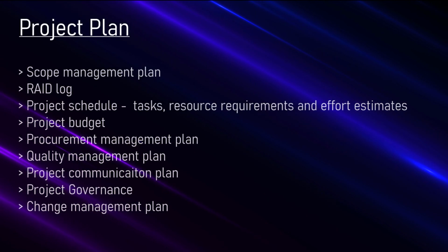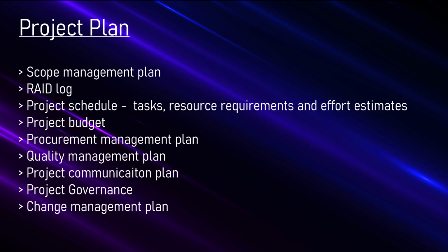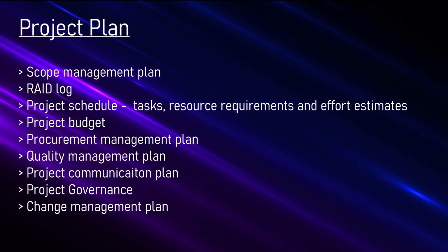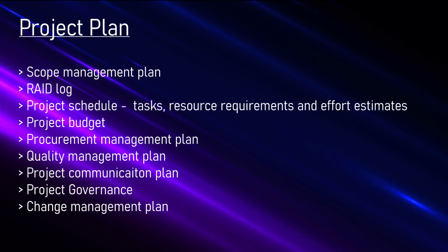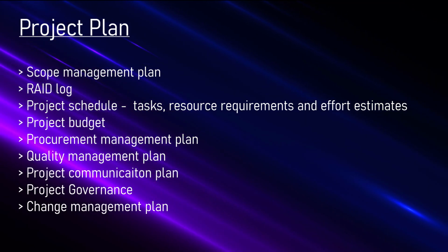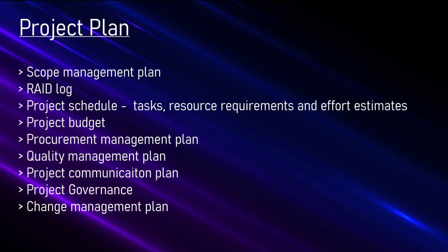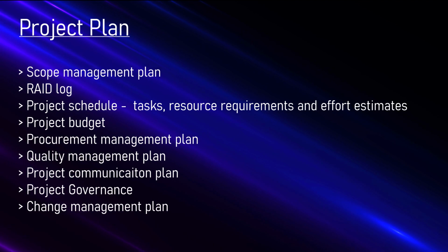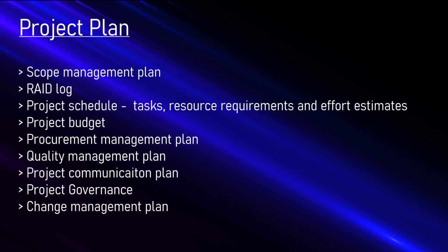This is then captured in the project plan and includes the scope, which is comprised of a work breakdown structure, WBS, a list of deliverables and a scope statement, a RAID log, including identified risks, dependencies, assumptions and actions in which to test these, and a list of tasks associated to each deliverable in the WBS.